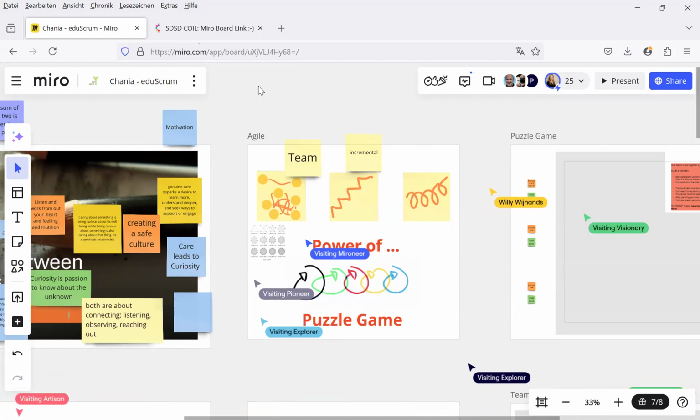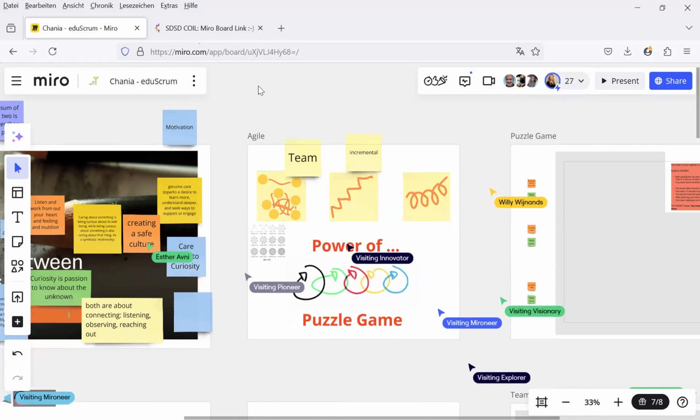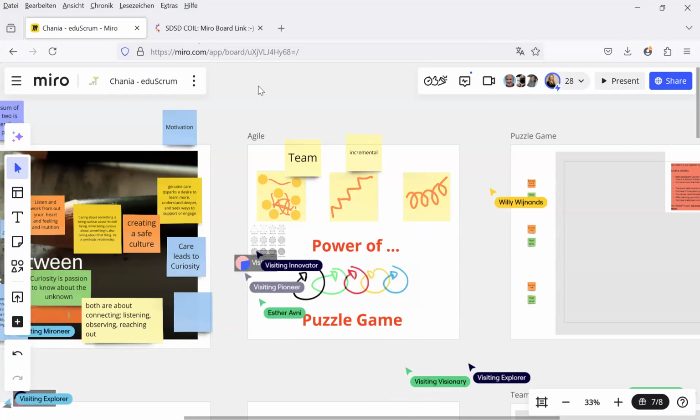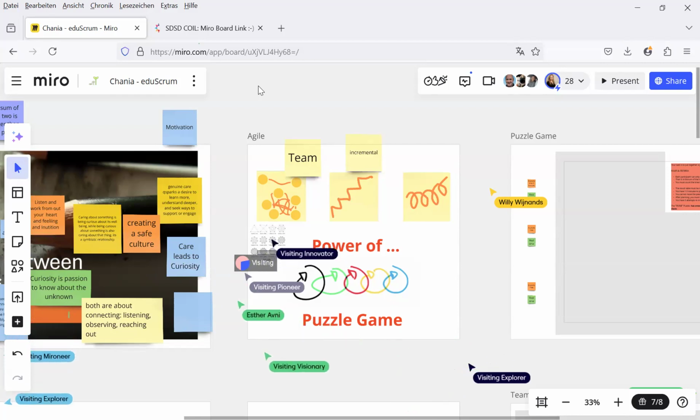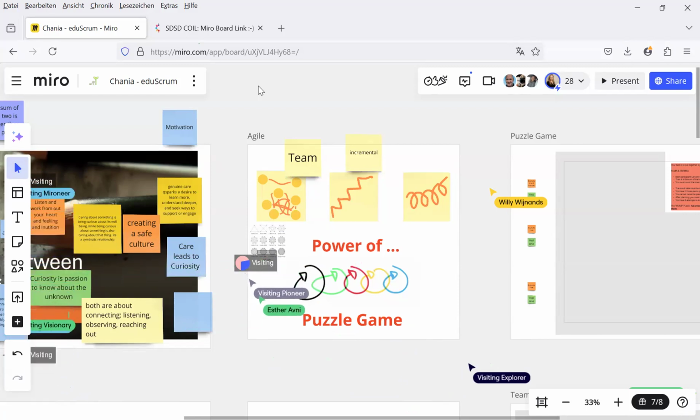I can open it up, and maybe I can have already a kind of info text of how to handle to-dos. And after 2 weeks more, I have the possibility to put something in, and then in the next step, after getting the overview of my to-dos, I have the possibility to check them, and in the next step, there's the new function that I have a kind of Kanban board: to do, busy and done.